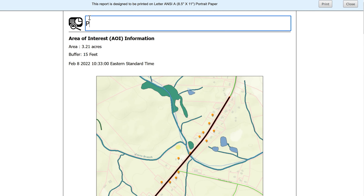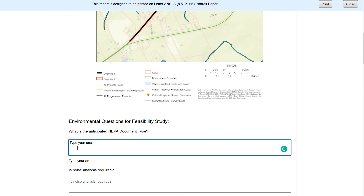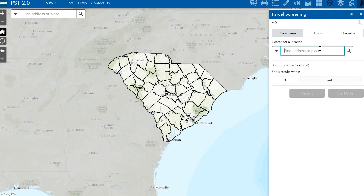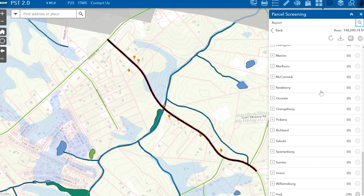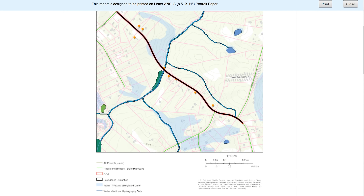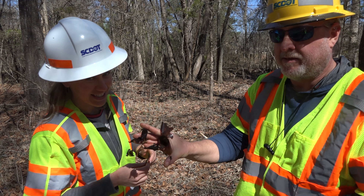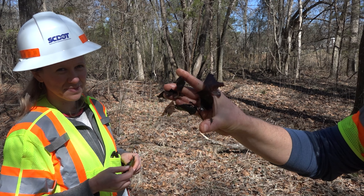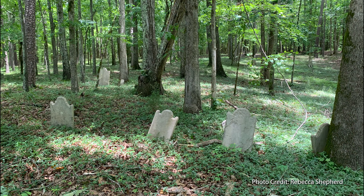ESO now provides the planning division with all critical environmental data needed to generate project-specific feasibility reports in 30 minutes or less, saving 10 to 12 hours of work. A parcel screening widget identifies the number of parcels along a project area; the right-of-way division is now able to generate an adjacent property owner list in a matter of seconds, saving two to three hours of work. PST was quickly adopted within ESO because of its user-friendly design and consistent screening results. Identifying red flags early avoids potential pitfalls leading to engineering redesign, increased cost, and lengthened project times, providing ESO and engineers with a more streamlined project delivery process.